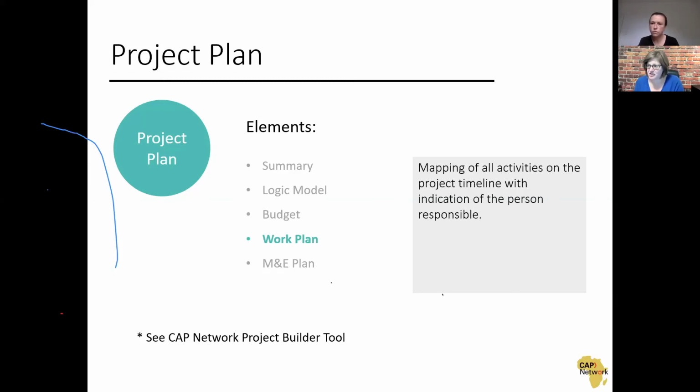So let's talk about cost sharing first. Cost sharing, generally speaking, if a funder puts it in their application form, it's going to be something that they use to decide whether to fund you or not. By that, I mean, if a funder is putting it in the application, it means it's important to them, probably means they want to see cost sharing happening, and they will look more favorably on proposals that do have a cost sharing component. That said, cost sharing does not need to be hard cash.